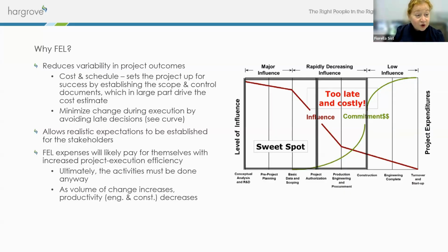However, as you progress through detailed design, purchasing equipment, constructing and installing it, the chances of making a significant change get slim. Let's say you determine that there's a more cost-effective or more environmentally friendly way to design, construct and operate the plant. Well, guess what? To reverse decisions, to unbuy equipment, to uninstall equipment that you newly installed, that's going to cost a lot of money and definitely going to make a huge impact to your overall timeline, right?